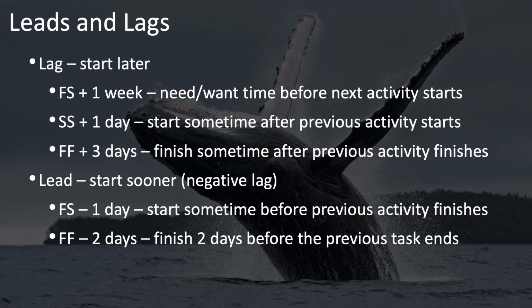Or using the example of the documentation of a system, once the system is finished, you may be able to finish wrapping up your final edits of the documentation within, say, 3 days after the completion of the system.